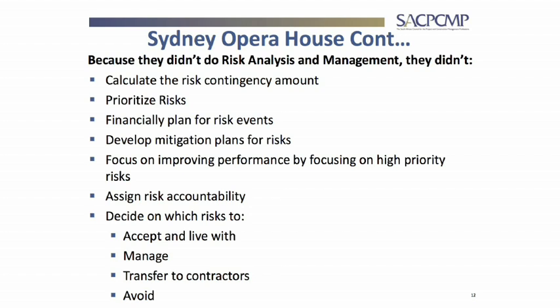And then we might say, well, we don't really have shipping time to put it on the sea. So what we want to do is we want to air freight the valves in. So it might change a 10-week lead time of transport to 2 weeks if we fly them in. But of course, that also comes at quite a higher cost. So if you had made provision for risk contingency, it won't impact your project budget. You will do a drawdown from your risk contingency budget, that bucket, and it will pay for the mitigation thereof. But at least it won't impact schedule.